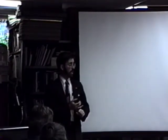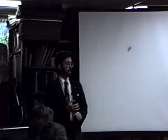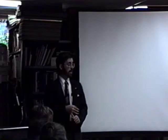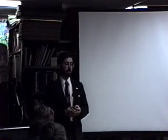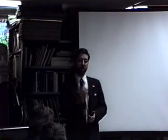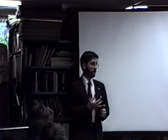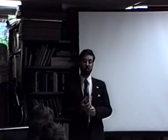And then in 1969, they removed the entire third floor and put in steel and wood decking. Not as much steel and concrete as the second floor, but they did do some. And so a big portion of this next phase that we're entering, and that's why I mentioned to come before November, is that during October, all the collections are being moved and the staff is being moved out. And in November, the demolition work begins, taking out the mechanical system and taking out the entire structural steel in